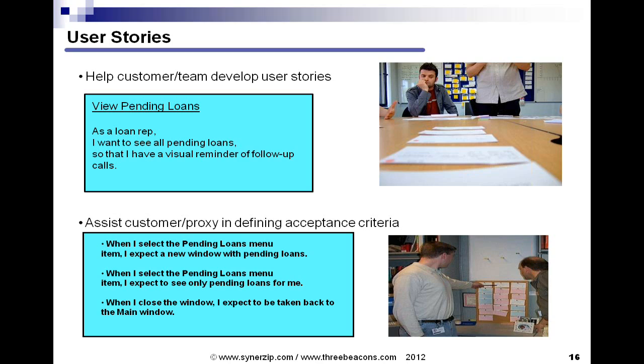A user story is not complete unless it has acceptance criteria on the back or within your tool. And this is where the QA person can really shine. Their knack for identifying scenarios or combinations that might cause issues can turn these acceptance criteria from average into great.